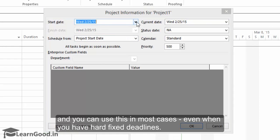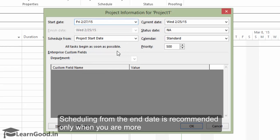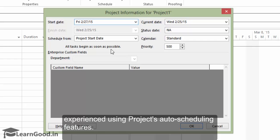Scheduling from the end date is recommended only when you are much more experienced using projects auto scheduling features.